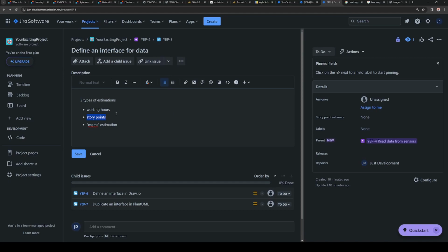Quite commonly, people are using story points, and usually in the first half year of starting a project, we estimate the complexity based on our experience or our mood and wishes, and we can estimate it less. Or if we are more pessimistic, I would say, then we can estimate more story points than it actually is. And then these values are not trustworthy. But the most important thing, for Scrum Masters probably and for the developers, is to observe and then re-estimate the story points of work done.